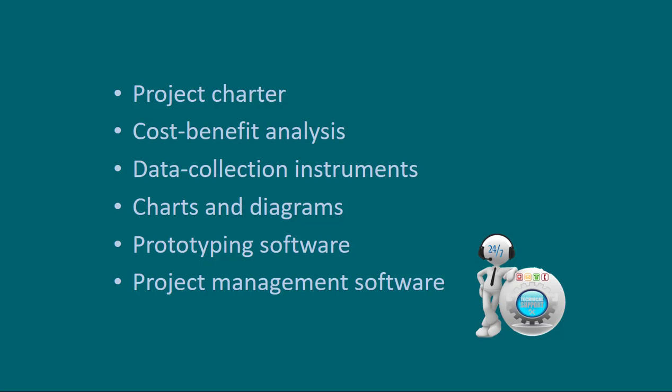Now, a project charter is just a short narrative statement that describes the objectives, the scope, the various methods, the participants, the deliverables, the overall timeline, and defines the project success. This is going to provide you a high-level overview of a project. It's going to promote a common understanding amongst all your stakeholders about the project.